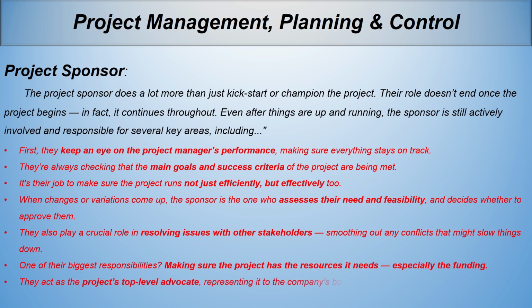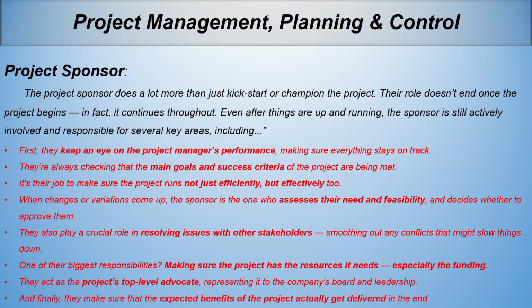They also play a crucial role in resolving issues with other stakeholders, smoothing out any conflicts that might slow things down. One of their biggest responsibilities? Making sure the project has the resources it needs, especially the funding. They act as the project's top-level advocate, representing it to the company's board and leadership. And finally, they make sure that the expected benefits of the project actually get delivered in the end.